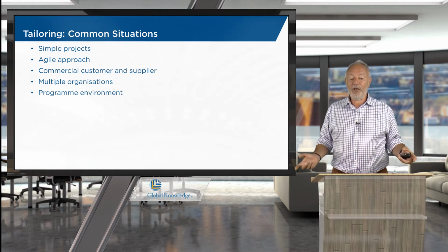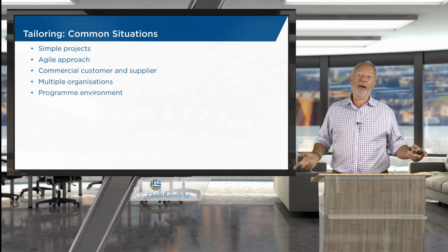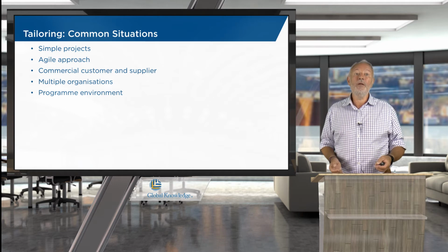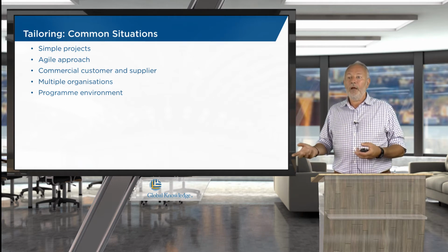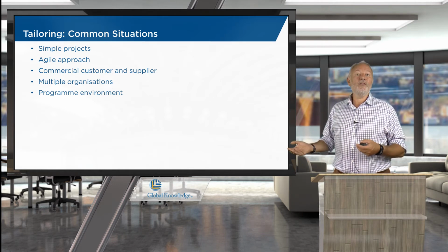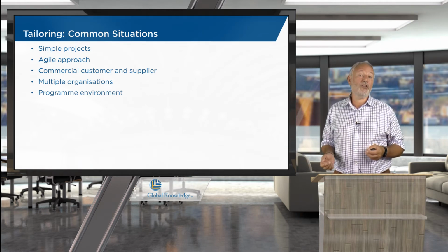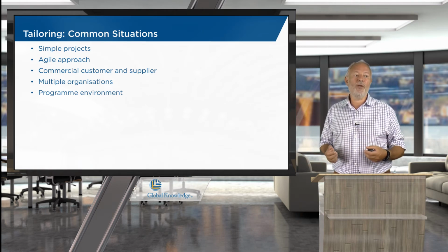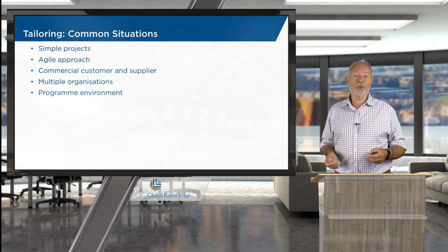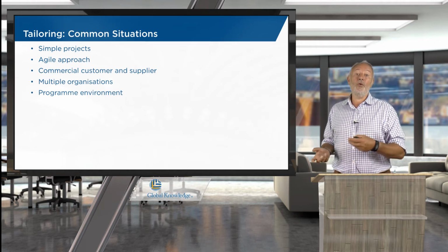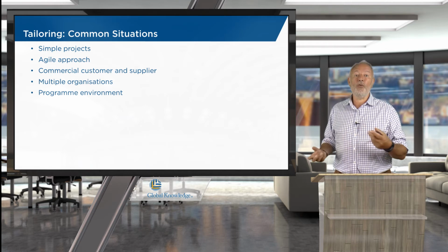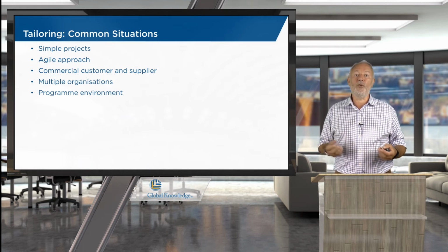If there's multiple organisations, remember we may have to manage the organisation side of things. What if we've got a number of senior users, because each of the departments in the organisation feel they need to contribute somebody to be a senior user? We may need to use user groups, and 1 or 2 people come from that to sit on the project board.